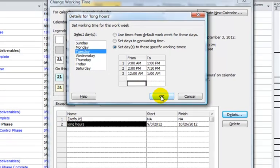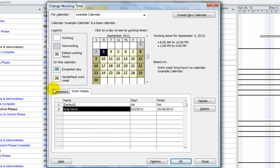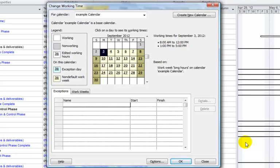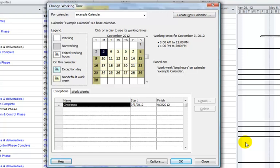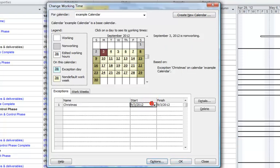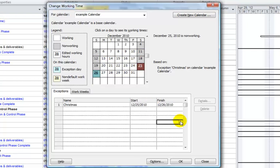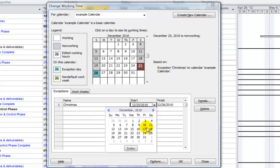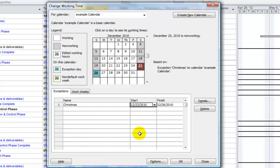When you're done, click the OK button. On the Exceptions tab, you can define your exceptions. For example, Christmas — let's say December 25th. In this example, let's say they also have December 23rd and 24th as a holiday. So we'll select the 23rd, and it finishes on the 26th, so these days become non-working days.